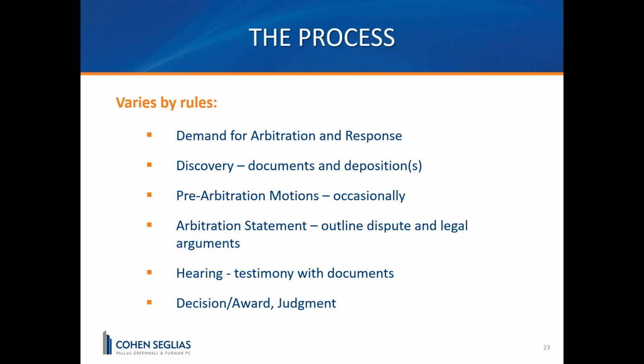The arbitration statement is like a pretrial filing that will list all of your legal arguments and lay them out, as well as everything that your witnesses are going to say and the documents that you are going to present. The hearings, as I said earlier, don't necessarily happen all in a row. We try to have that happen as often as possible, but lawyers are just terrible estimators of time. And generally, when they say the arbitration is going to take 3 days, it takes 6. So you don't have them all at the same time.